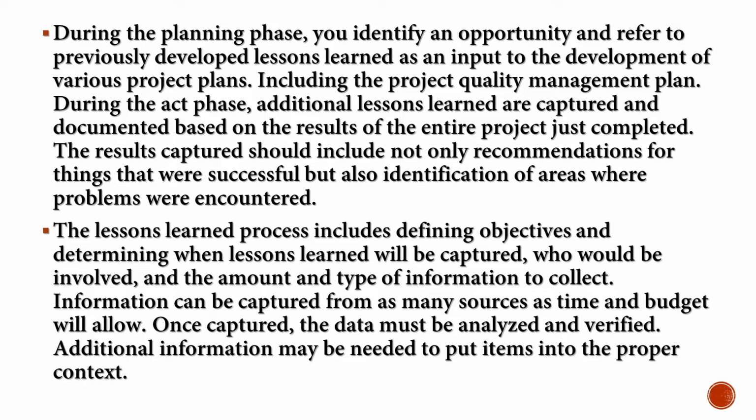You identify an opportunity that refers to previously developed lessons learned as an input of various project plans, including the project quality management plan. During the act phase, additional lessons learned are captured and documented based on the result of the entire project just completed. The result captured should include not only recommendations for things that were successful, but also identification of areas where problems were encountered.